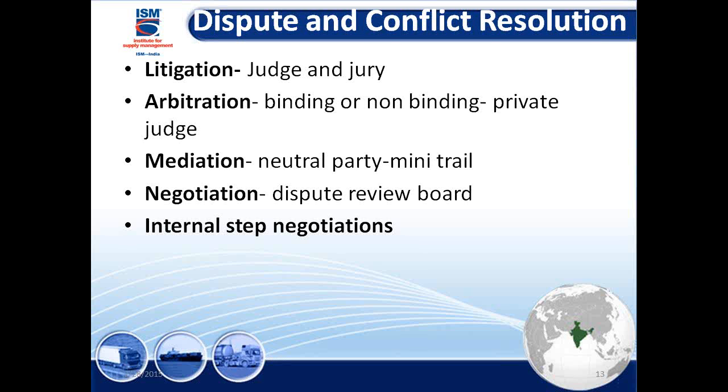Now when we come to dispute resolutions, all of you know litigation. We need a judge, we need a jury, which could take years and years. Private sector can't wait for litigations. If the private sector has to wait for 10 years, the company is closed down. So they normally encourage arbitrations, mediations, negotiations. Arbitration is becoming very popular.